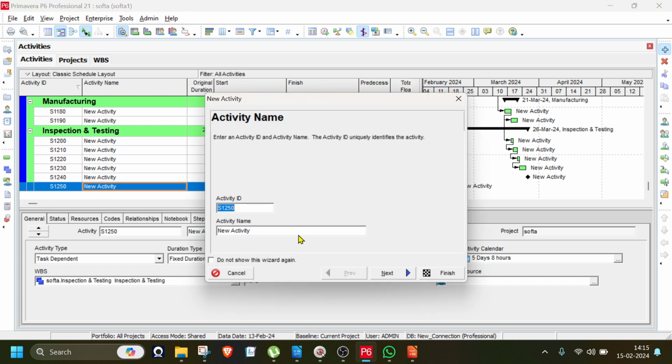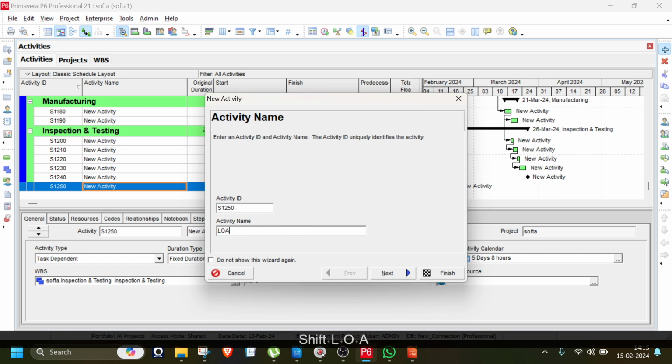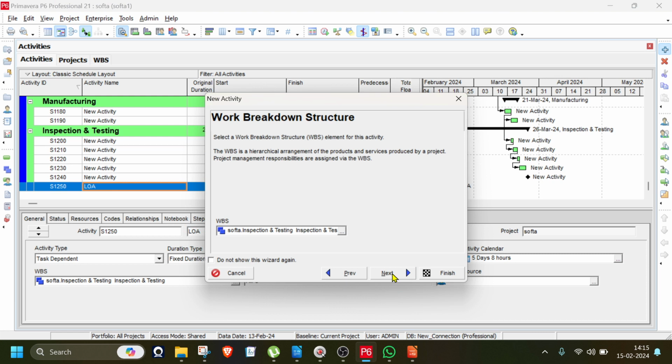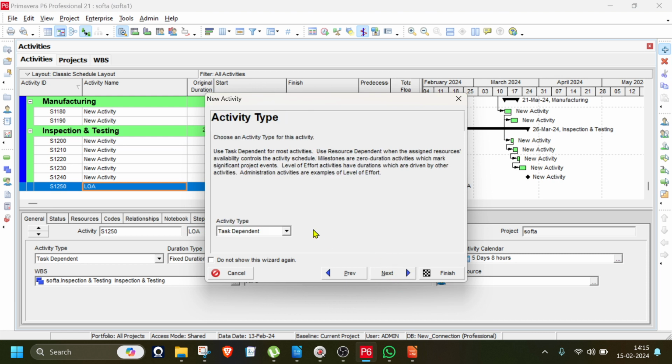Okay, this is not calculated in the project things, but we need to know whoever is working apart from the external things. Equipment maintenance, clerical jobs, meetings. The client might be having meetings, so there is somebody that will take the minutes of the meeting. All these clerical jobs and meetings will come under level of effort. Now there is a clerk working from the beginning of the project till the end of the project. Clear? Now I am going to calculate the level of efforts of the clerk.